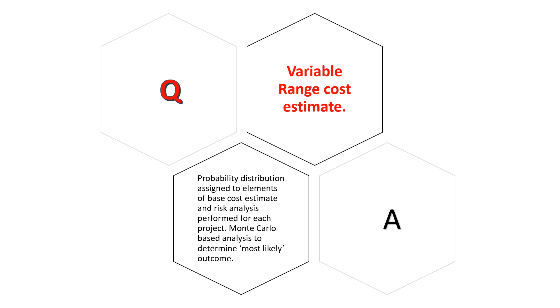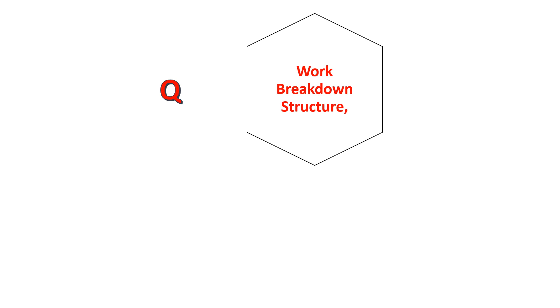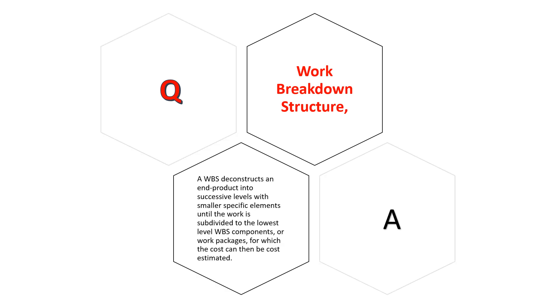Work breakdown structure: A WBS deconstructs an end product into successive levels with smaller specific elements until the work is subdivided to the lowest level WBS components, or work packages, for which the cost can then be cost estimated.